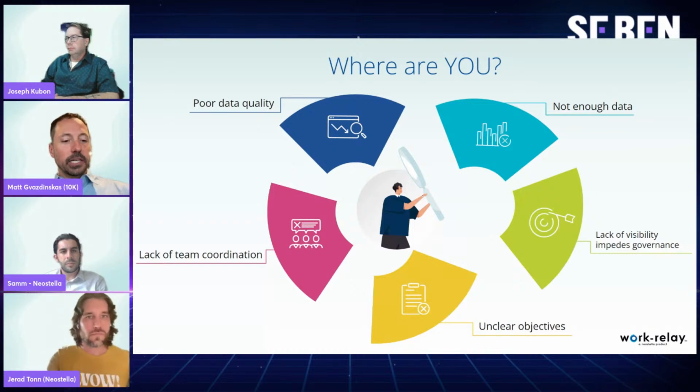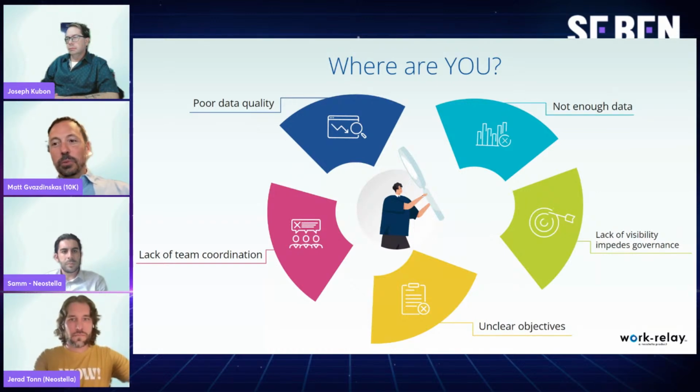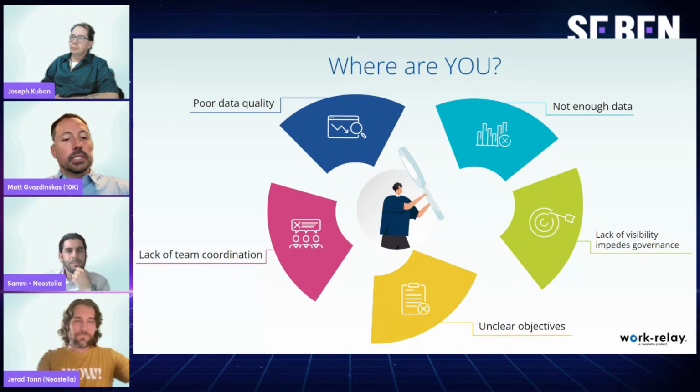And when we launched it into the wild, we found that all these product managers and business analysts are writing user stories in completely different ways with completely different levels of detail or very little detail. And so again, in this case, the technology didn't fail. It was sort of the lack of our ability to coordinate the team in a really solid way, so that we were dealing with consistent inputs. And that just goes to show that you can have all the rest of this right, but if one piece is wrong, it can really amplify a poor result.